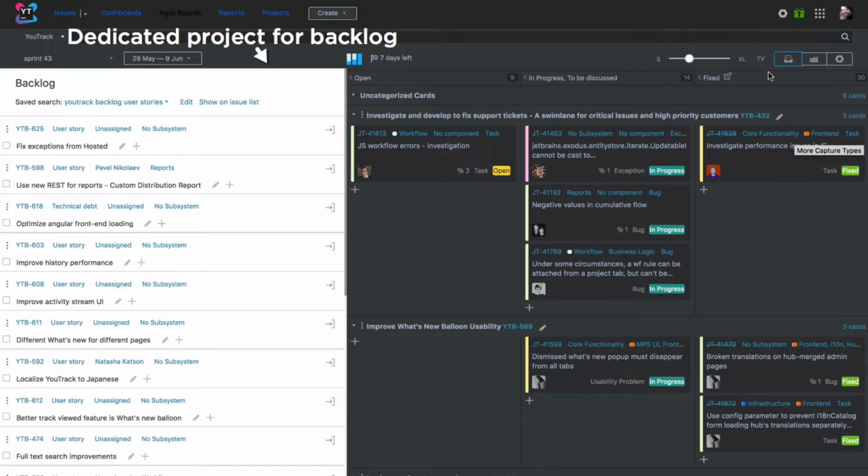So in our public YouTrack project, we have about 50,000 issues right now, and it's pretty hard to process and to create user stories from these feature requests and customer requests when you have so many of them. So we decided that we'll just create a separate project for our backlog, and we'll link our user stories with the feature requests from these public projects.